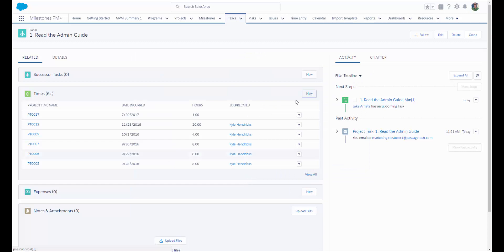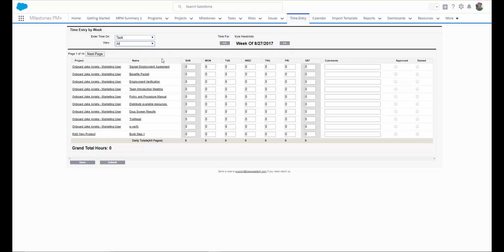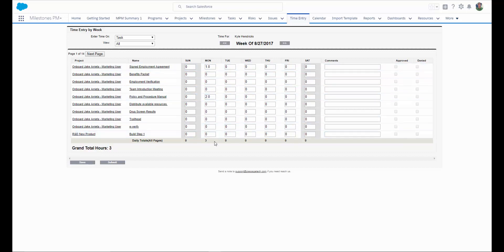Milestones PM Plus Premium Edition includes a time entry grid where you can log time against any objects in Salesforce. Here we're logging time against project tasks. Any list views that you have created for your project tasks will show up here. Users can easily enter their time as they go throughout the week. You can see that the app will subtotal their hours as they go so they can ensure that they are logging all of their hours. And you can use the hour totals to keep track of over or under usage of your resources. All of the time that a user logs against any object or list view will appear in the grand total for the week.